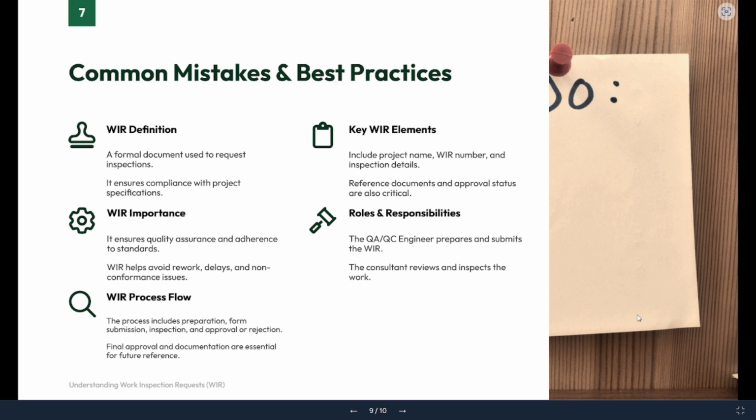Then, for any internal inspection you are doing at site, you need to ensure that the quality and the installation are the top priority for you. The quality should be perfect. Installation should be as per drawing. If there is any deviation, you need to make your own red line drawing, and you have to ask the construction crew member why there is a deviation from the approved drawing. For sure, there may be some reason for the deviation, maybe clashes, or in recent times some changes happened from the consultant or the client. So you need to take care of all this.